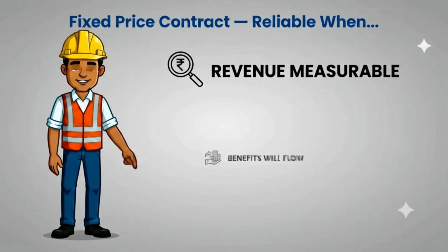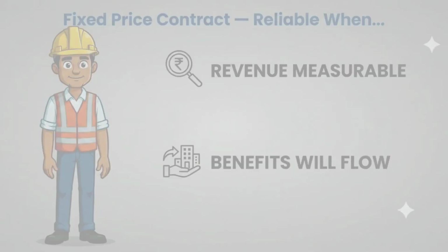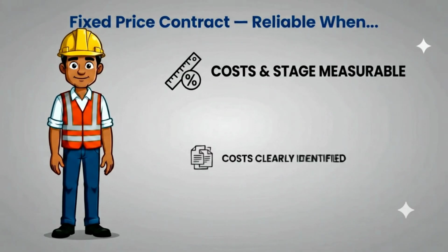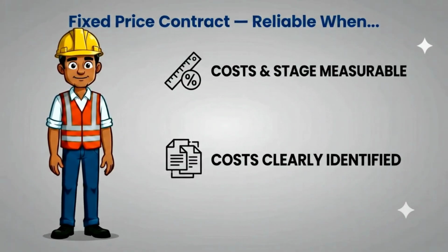1. Revenue can be measured reliably. 2. Economic benefits will probably flow in. 3. Costs and stage of completion can be measured reliably. 4. Actual costs can be clearly identified and verified.